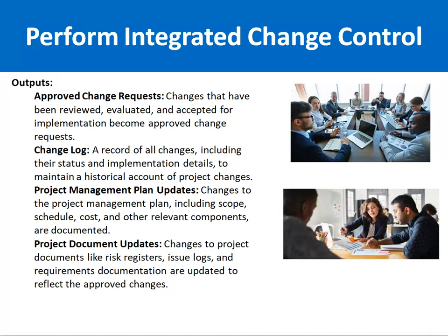Then the change log. Assume it as an Excel sheet in which we record all the changes, including their status and implementation details, to maintain a historical account of what changes were made in the project as per the change control meeting. Then the project management plan updates.